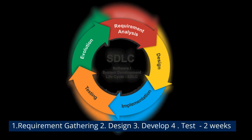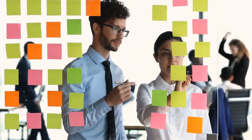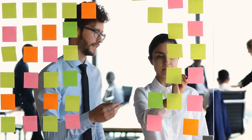Don't think that requirement gathering for that sprint will happen within the two weeks — requirement gathering and designing happen prior to your sprint. During the sprint time — whether two, three, or four weeks — development, testing, and deployment happen. Developing the product, testing the product, user acceptance testing, and deploying the code to production — only these four things will happen during sprint time. This is an important distinction for interviews: if they ask what is a sprint, clearly explain that requirement gathering and design are separate.